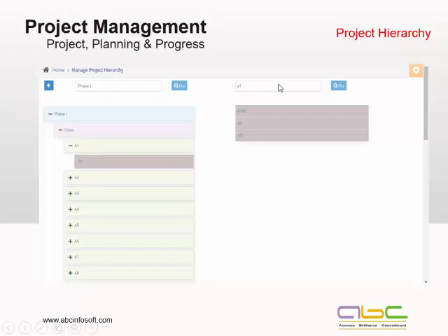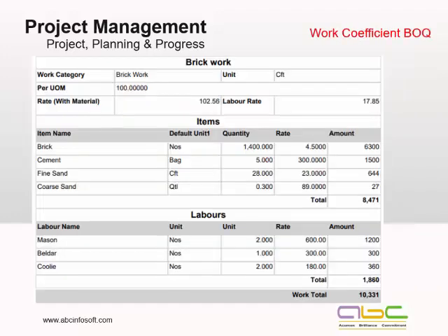And then here on the right-hand side, these are work templates. I have selected the A1 template and linked it with the A1 unit. Whenever we have different sizes or any variation, we can have a different work template and attach it to the particular unit. With this, I can get a complete BOQ of the things.